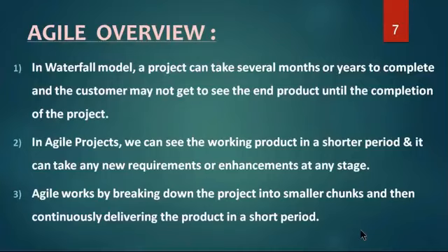product to the customer. As per agile rules, how often? Weekly once, or every 2 weeks, or 3 weeks, or 4 weeks, not beyond 4 weeks. It should not go beyond 4 weeks. That's the rule in agile.